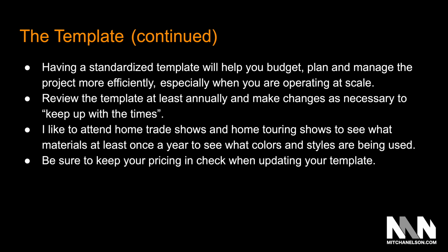Be sure to keep your pricing in check when you update your template. For example, I used the example before of we went from satin nickel to black. When we did that, we had to make sure that we found black fixtures that were of a similar price to the satin nickel fixtures, so that we weren't affecting our ability to budget for these properties as we plugged in these changes.